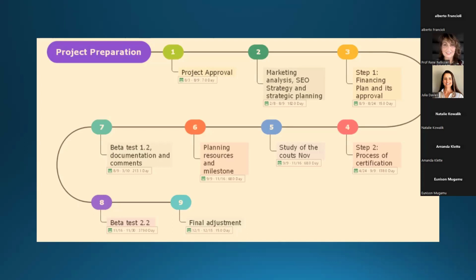Let's say you have 24 months. If I write down those milestones and I break them up in their time components and they don't add up to 24 months, it means my project cannot be completed. I know that up front because I'm beginning with the end in mind. So work backwards so that you understand what the project milestones, these big things are. And once you have all of them, how long does it take me? There might be certain milestones that can happen at the same time, in parallel, or in series. So how do you make provision for that?